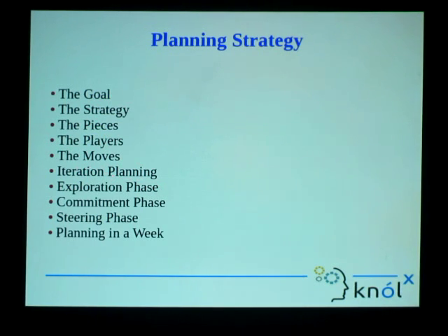Next is iteration planning. That is, try to include much smaller cycles in that short release cycle itself. For example, in our sprint, we do daily stand-ups with the team on a whiteboard. Those are the tasks that we need to do on that particular day. We define them according to the day: today, these are the tasks that we need to complete. That is a kind of iteration planning that eXtreme programming says us to do.